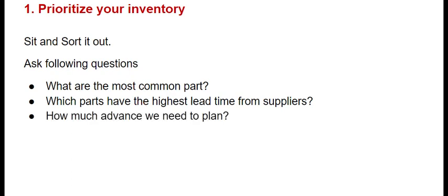So for one part, you need to see how long it takes and how much in advance you need to plan. For example, to save some cost, many people import their parts from China, India, Vietnam, or Korea. So when you are importing the parts, you have to know how much time that is going to take to deliver those parts, and make sure you order enough of them so that for the next time it will be enough and you don't run out of your parts.